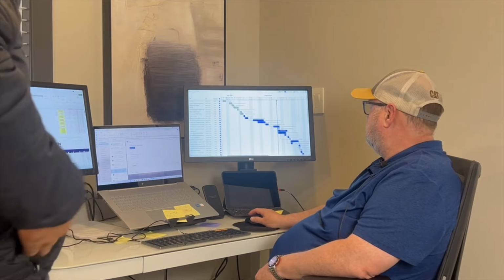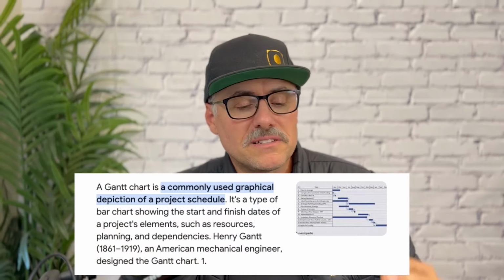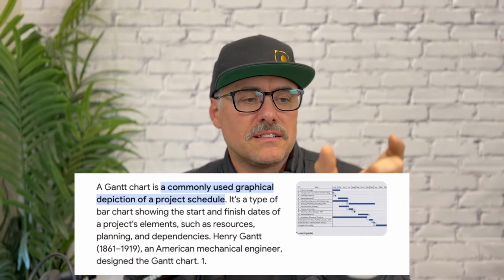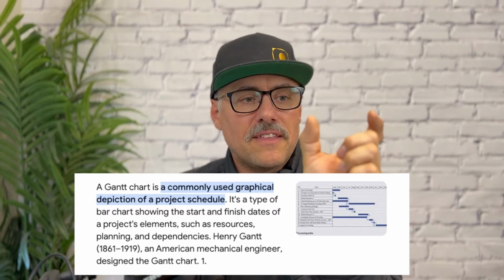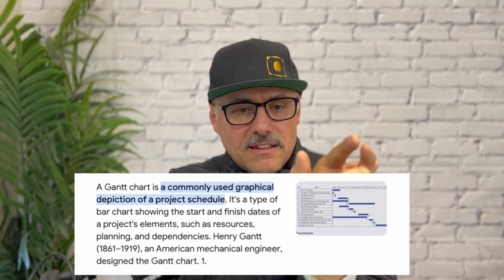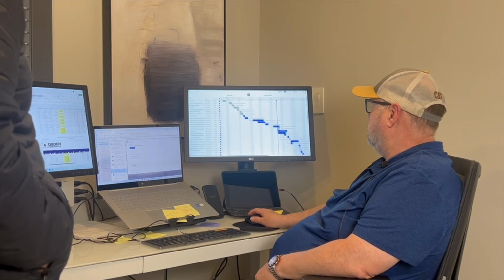You go in and start working on a Gantt chart. Basically, the way a Gantt chart goes is, let's say there's the plumbers here, and that's a line. So it gives you the date and it goes all the way across. And then we'll drop down to the electrician. And there's some overlap because you can have the electrician working there during the same time the plumber's there, as long as the electrician doesn't have a ladder over top of where the plumber's working. We don't want that. Correct?